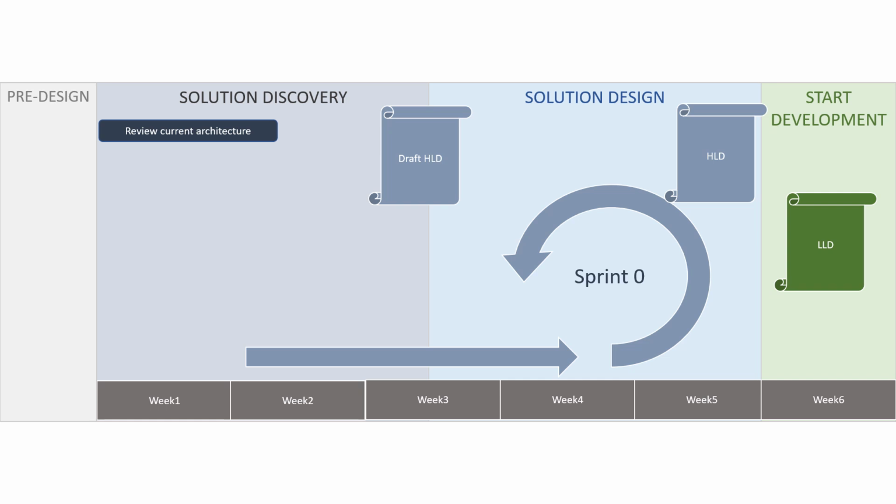Note, if the delivery manager is planning sprint zero, then there are a lot of deliverables produced as an output of sprint zero. They are not the responsibility of the solution architect, but they are there, and the solution architect can help in them, like the document or presentation of the project kickoff, project charter, communication plan, meeting schedule, RASI matrix, requirements documentation, risk and mitigation approach, CI/CD process, project tools, team space, stories groomed for the next couple of sprints, how testing will be done, environments, licenses, and so on.